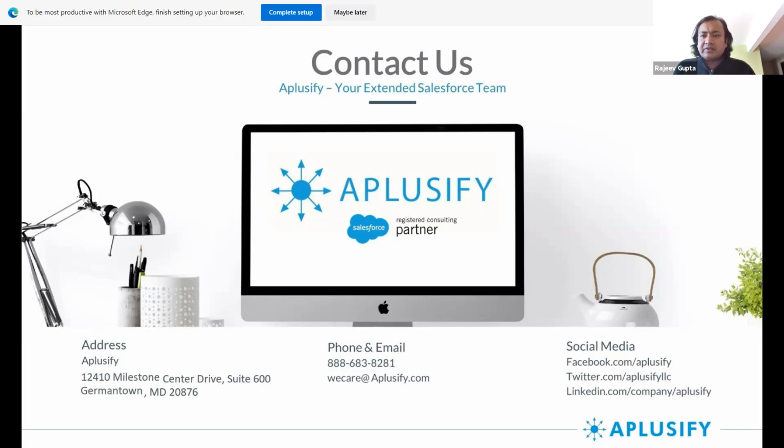I wish there was a magic answer, but different companies charge at different hourly rates, and different individuals cost differently. I can only say within our price point that we charge, an upgrade from one version to another is generally, if everything is documented, sub 200 hours of work. So any upgrade within our costing is roughly $10,000, while other companies may be charging more.